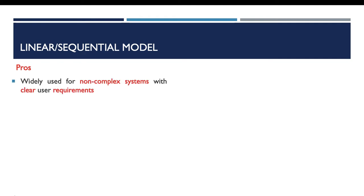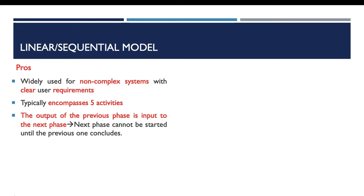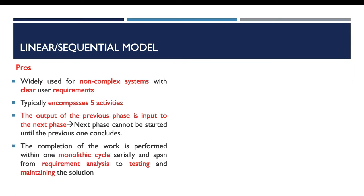The linear model mainly encompasses five activities, and the output of the previous phase is the input to the next phase. So we cannot start any phase until the previous one concludes. The work is performed within one monolithic cycle, which starts from requirement analysis to testing and maintaining the solution.